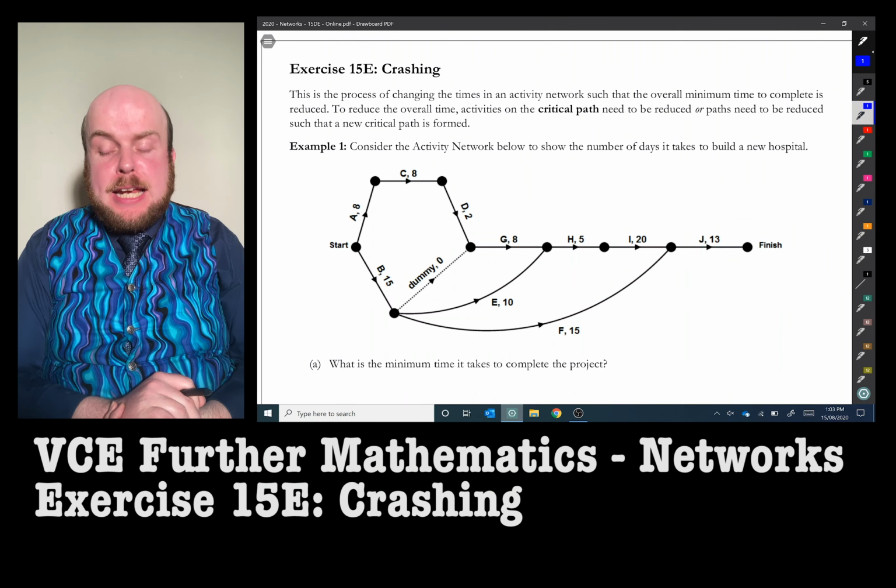this project. A number of other reductions are possible, but each has a cost associated with the time reduction. They are shown in the table on the right, along with the cost associated with each hour of reduction. Note that each of the reductions could be completed partially, so a possible reduction of up to 4 hours would allow a reduction of 0, 1, 2, 3, or 4 hours. Reductions can only be whole numbers, for example, 3 hours, not 3.5 or 3.3.